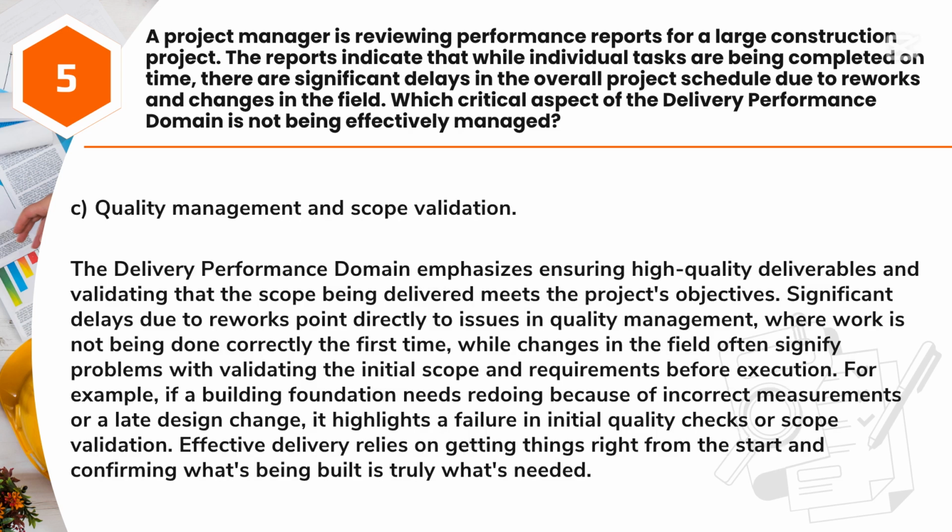Answer: C. Quality management and scope validation. The delivery performance domain emphasizes ensuring high-quality deliverables and validating that the scope being delivered meets the project's objectives. Significant delays due to reworks point directly to issues in quality management, where work is not being done correctly the first time, while changes in the field often signify problems with validating the initial scope and requirements before execution. For example, if a building foundation needs redoing because of incorrect measurements or a late design change, it highlights a failure in initial quality checks or scope validation. Effective delivery relies on getting things right from the start and confirming what's being built is truly what's needed.